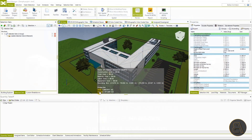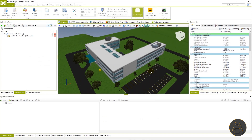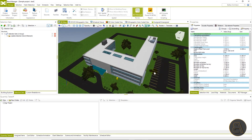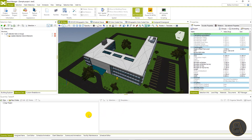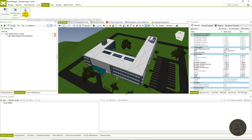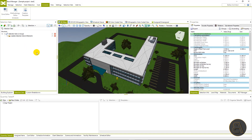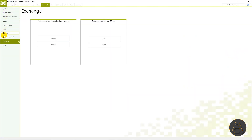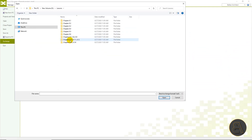Here we are in the Bexel Manager with the well-known sample model we use for every demonstration. I will guide you through the main steps required for smart scheduling: creation of zones, methodologies, and creation templates. Our first step is defining zones. In order to do that we need to divide the building into levels and construction phases. We already have building levels inherited from Revit, and to save some time we will import the selection sets of construction phases using exchange files provided with this lesson.